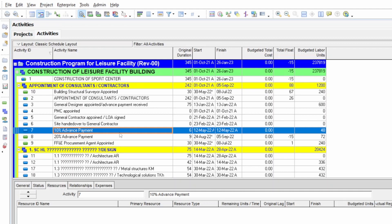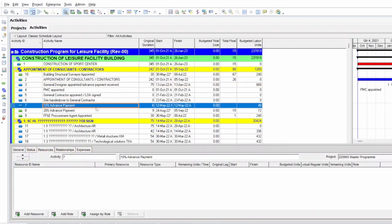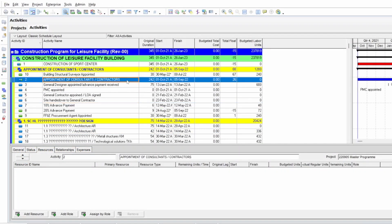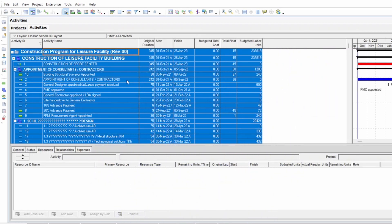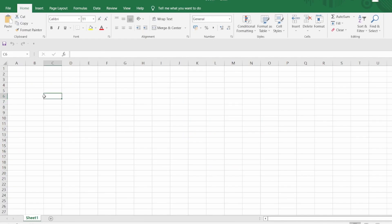Now what you will do is click anywhere in the program and press Ctrl+A to select all the data, then press Ctrl+C to copy all the data. Once you do this, open Excel and copy the information there. Once Excel is opened, select the top-left cell and press Ctrl+V to paste the data from Primavera into Excel.